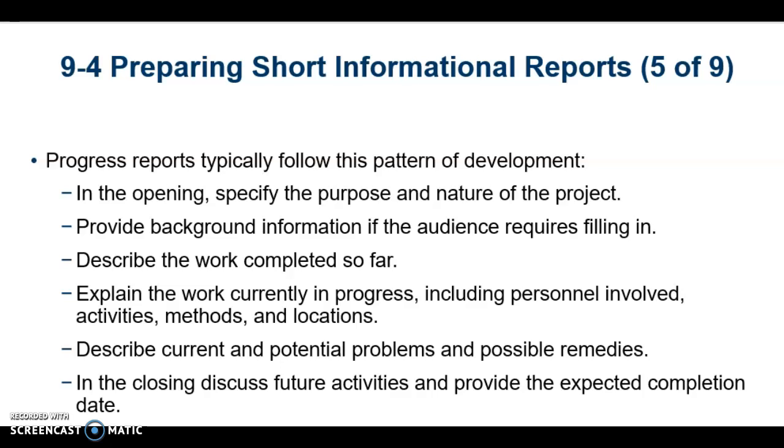In the opening, you're going to specify the purpose, then provide background information if the audience needs some background information. You're going to describe the work completed so far, explain the work currently in progress, including personnel involved, activities, methods, locations, describe current and potential problems and possible remedies. In the closing, discuss future activities and provide the expected completion.